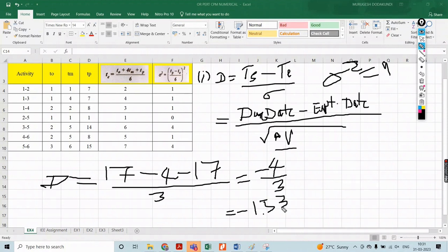Okay, this value will be considered with respect to the actual value of the variance to complete that work. This is how you need to evaluate the probability. Consider the value from that particular table, then make the evaluation. The probability of Z less than or equal to minus 1.33 equals 0.0918. This is the actual value required for the evaluation of that particular probability. Is this clear? Raise your hand.